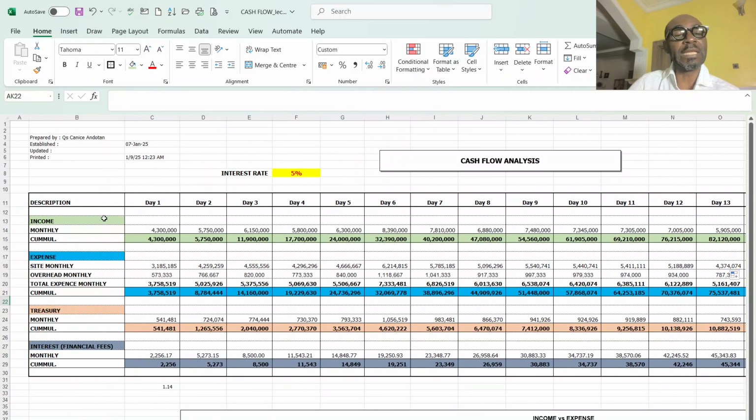So after linking it, if you remember in one of the episodes where I explained how to prepare a budget, that will now translate to you applying your markup that will give you the bill rate. And in that episode I explained how overhead and profit are generated, and I told us there that the amount in the overheads is part of your expense.